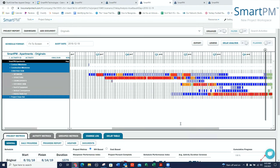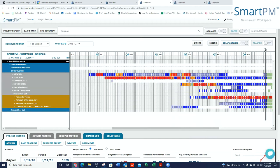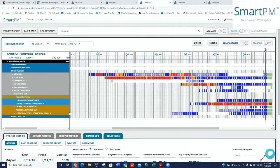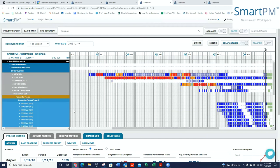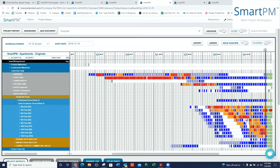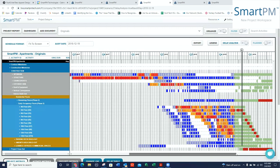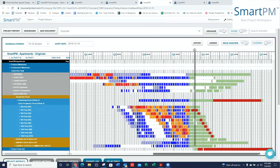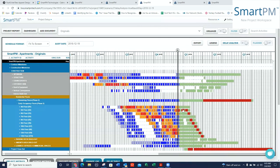And I can see this historical critical path going through site work into structure, ultimately into exteriors, and then down into my interior build out. I can continue opening that up, continue to look at where are my critical trades historically. I can see my critical and near critical paths. So if there are any delays, I know exactly where they are.